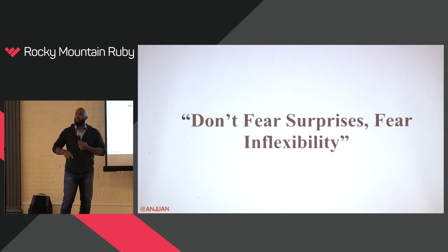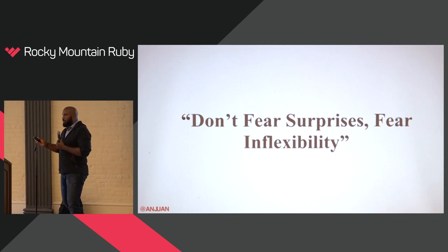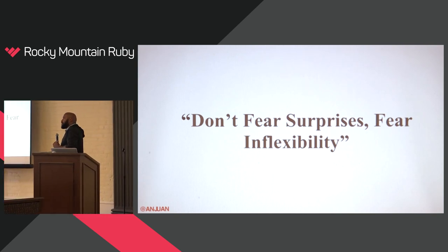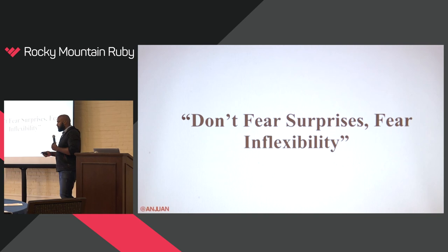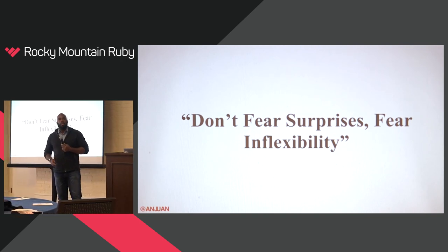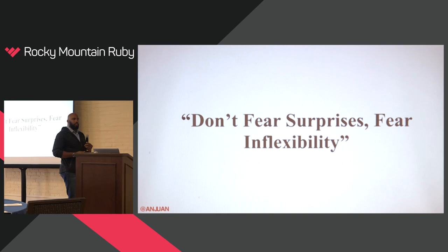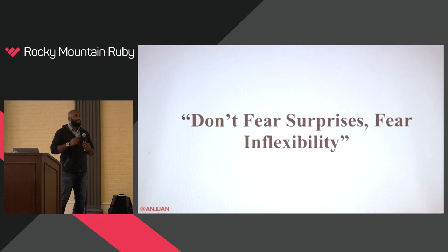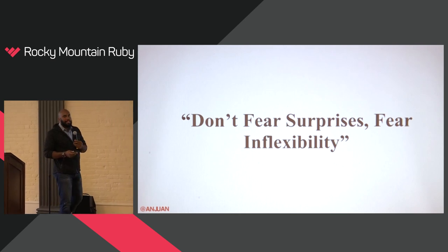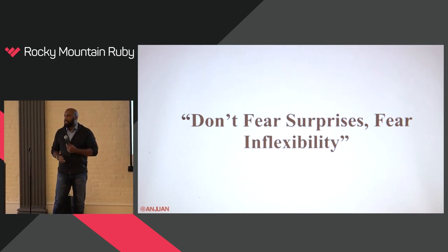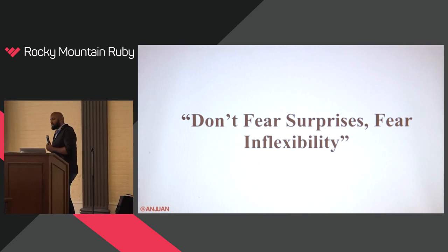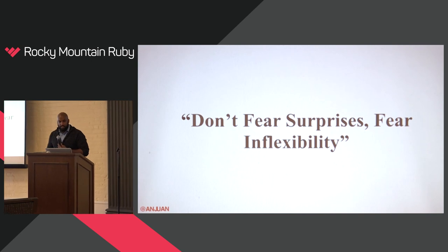I was like, well, wait a minute, guys. Why don't we simply set this up as 1 week sprints? We do the findings that are the most urgent, that have the most value, and then we remediate those. And so I set up this cadence where I built in a schedule of sprints where we did the findings, and then we learned something every sprint that we built into the next iteration. And by doing that, we actually ended earlier than planned. And so by building flexibility into the schedule, by building the ability to react to changes, by building an ability to react to surprises, my team was much more effective.